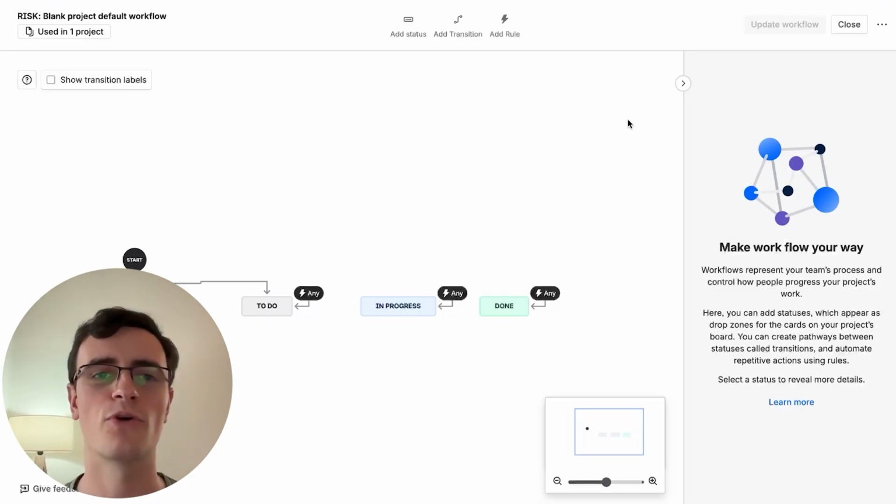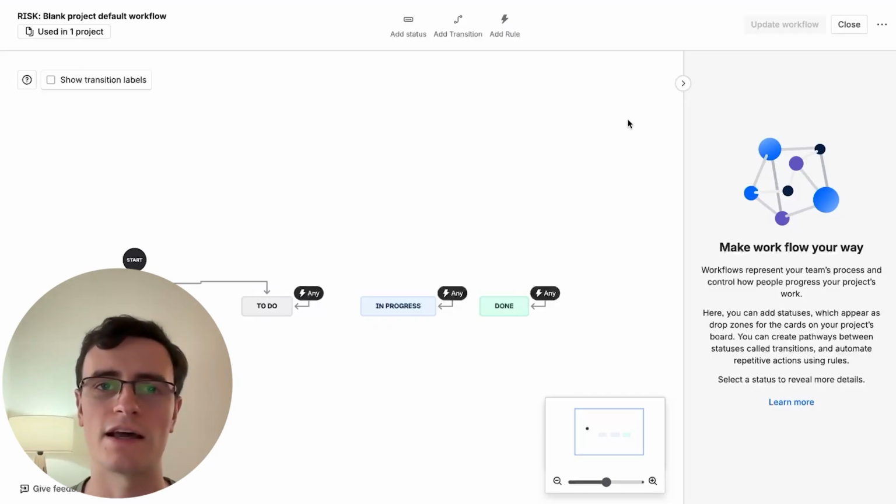So again, for the risk register, we want to have a custom workflow. In the workflow, we want to treat the risk as it comes and as we manage the risk. So first we have risk identification, then assessment, treatment, approval, and output. Let's also build our workflow like that.